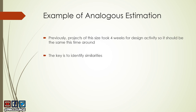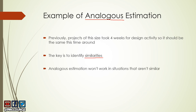The key here is to identify similarities. You cannot look at a previous project which has no similarity with the current project and make any kind of estimation. Remember, the word analogous comes from analogy — you have to draw comparisons. You cannot compare apples and oranges, so analogous estimation will not work in projects or activities that are not similar. Similarity is the key.